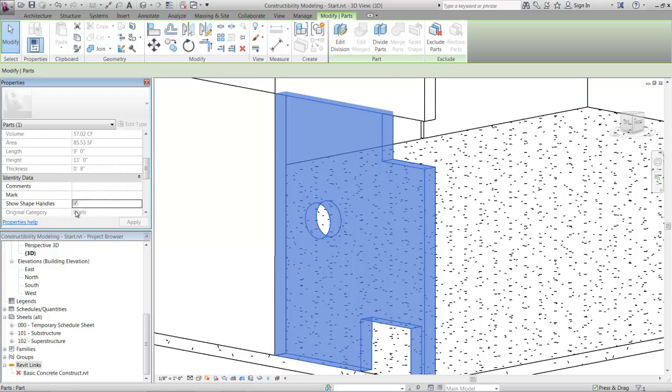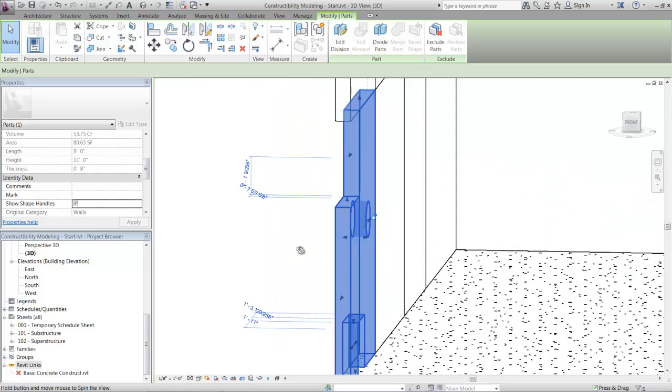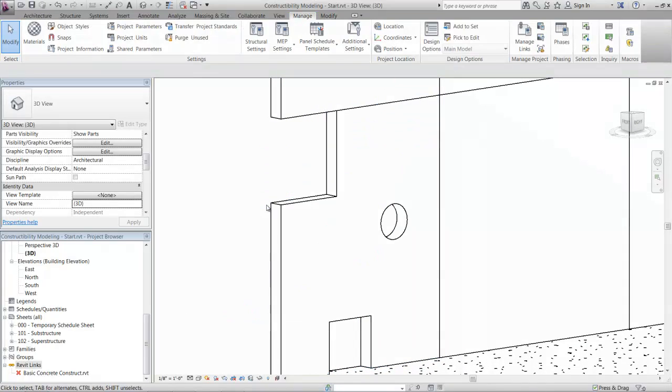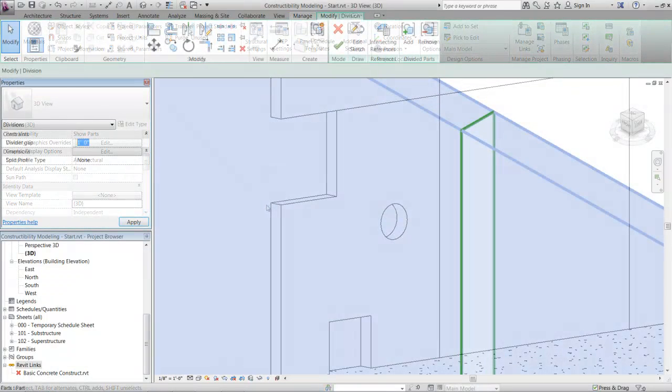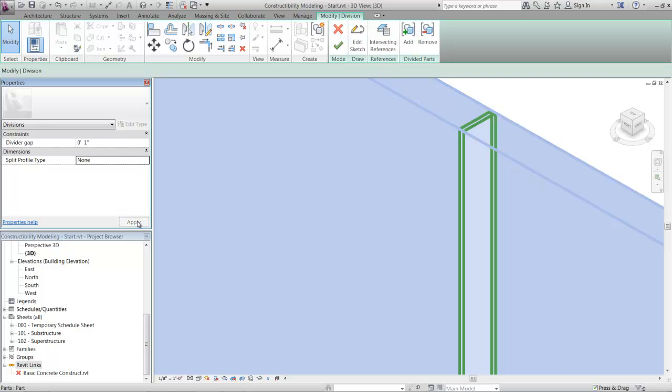Design intent models can be further modified, dividing slabs into individual concrete pours, breaking partitions to show accurate wall construction, or merging components together to better represent how the elements will be constructed in the field. Here we see a specific profile being added to the cast-in-place wall segment.